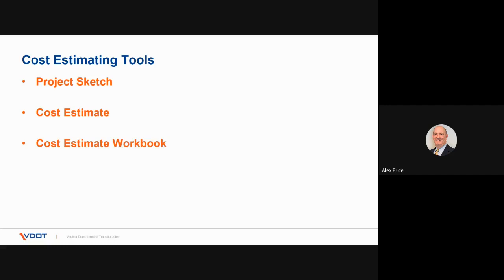Project cost estimates should be developed and reflect all items in the project description and sketch. We ask that you use a line item estimating method with the understanding this level of detail may not be known at the time of submittal for all applications. Line item estimates will allow us to better understand how you developed your estimate.